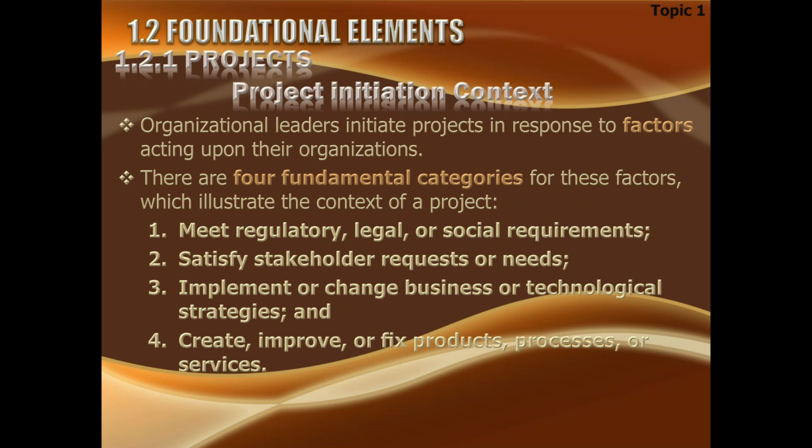the organization may have to bring this change, or implement or change business or technological strategies. If the organization itself has changed its strategies and its direction, that may also amount to bringing change to the organization through projects. And last but not the least is create, improve, or fix product, processes, or services. That is the internal problem. That internally the way of working, the operations we have, needs to be enhanced or improved or continuously improved. Therefore, we may initiate a project for this kind of improvement.